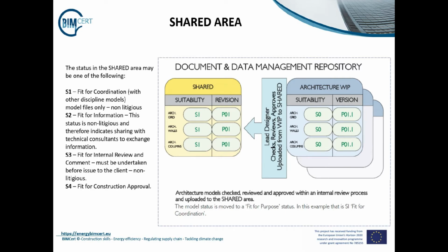S3 means that it's fit for internal review and comment. This must be undertaken before issue to the client. And finally, S4, fit for construction approval.